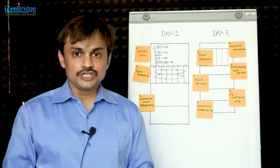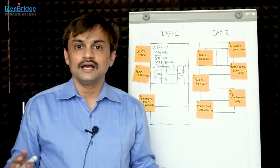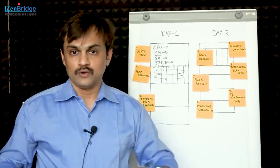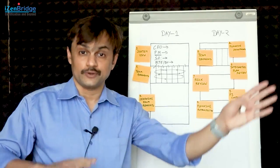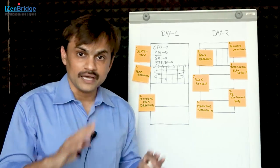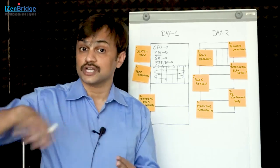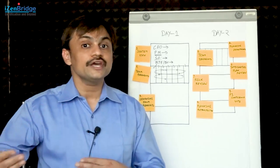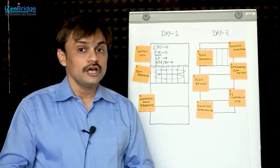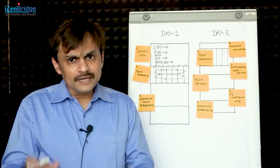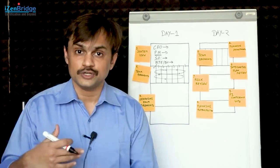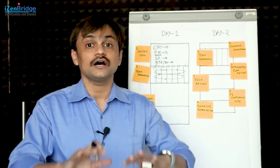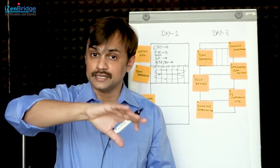We got the big picture and each team got into separate rooms. You can visualize it as a big meeting happening - all of us in the big conference room. We got briefed and once the briefing was done, all the Agile teams went into separate rooms, and in those rooms they were planning their part of the work. In between, there were some Scrum of Scrums happening. Sometimes the Scrum Masters were doing it, sometimes team members were also moving from one room to another to communicate about dependencies and issues as they discovered them. If two teams are closely working together, they may decide to sit in the same room but at separate tables. Teams are doing their part of work while also integrating their work, and as a result they come up with a draft plan.